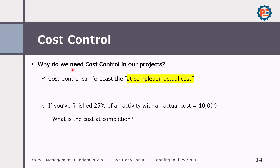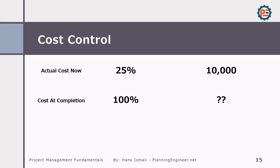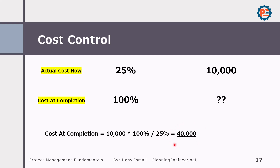Cost control can also forecast the cost at completion. For example, if we finish 25% of an activity with an actual cost of 10,000, what could be the cost at completion? Using a simple cross-multiplication formula: cost at completion = 10,000 × 100 ÷ 25. This tells the project manager or company owner that if we continue at this performance, the project will cost this amount — and accordingly we know if we are making a good profit or losses.